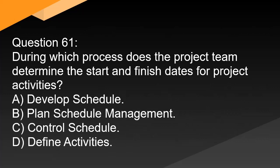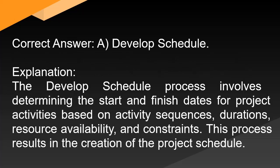Question 61: During which process does the project team determine the start and finish dates for project activities? A. Develop schedule. B. Plan schedule management. C. Control schedule. D. Define activities. Correct answer: A. Develop schedule. Explanation: The develop schedule process involves determining the start and finish dates for project activities based on activity sequences, durations, resource availability, and constraints. This process results in the creation of the project schedule.